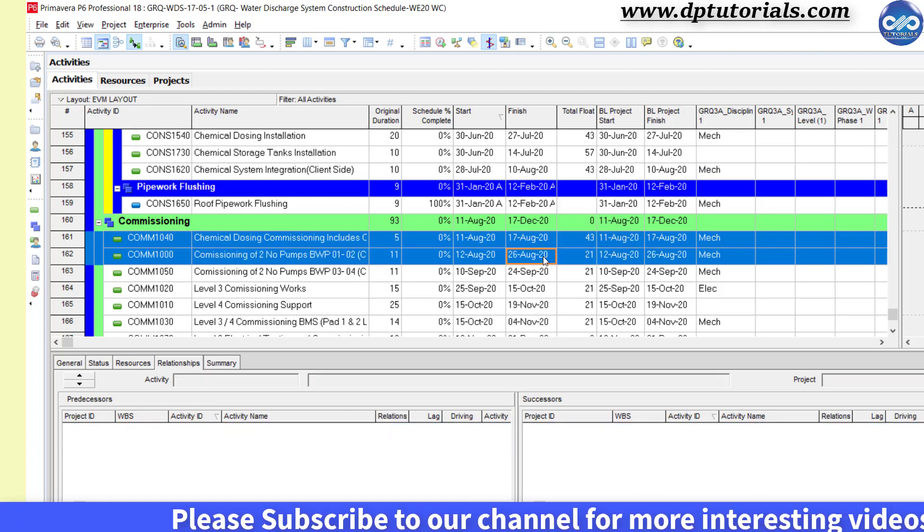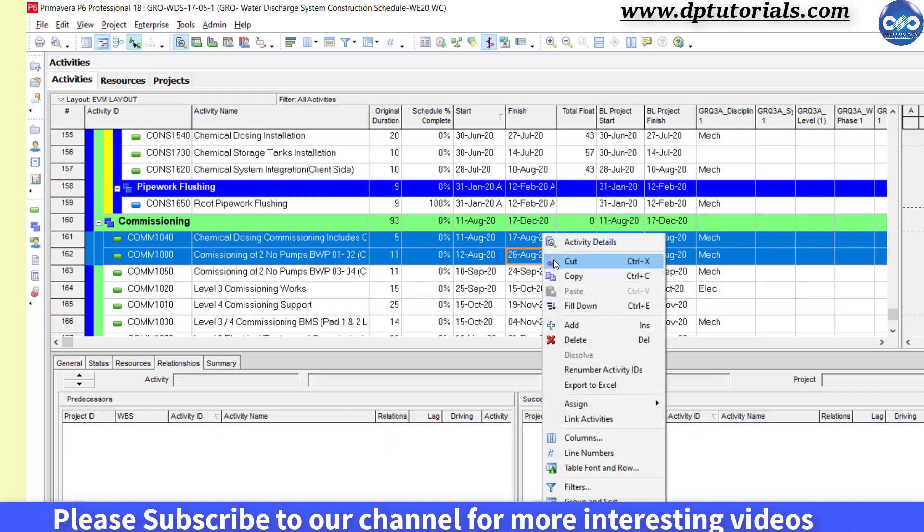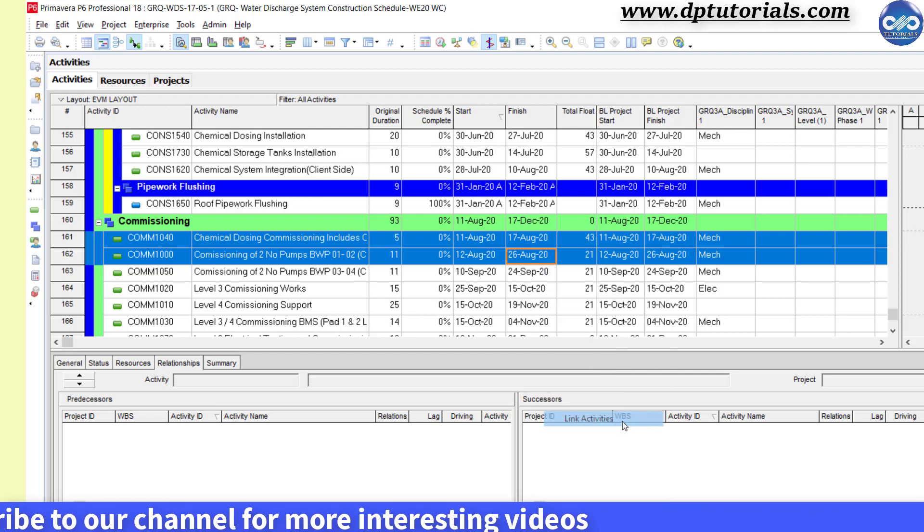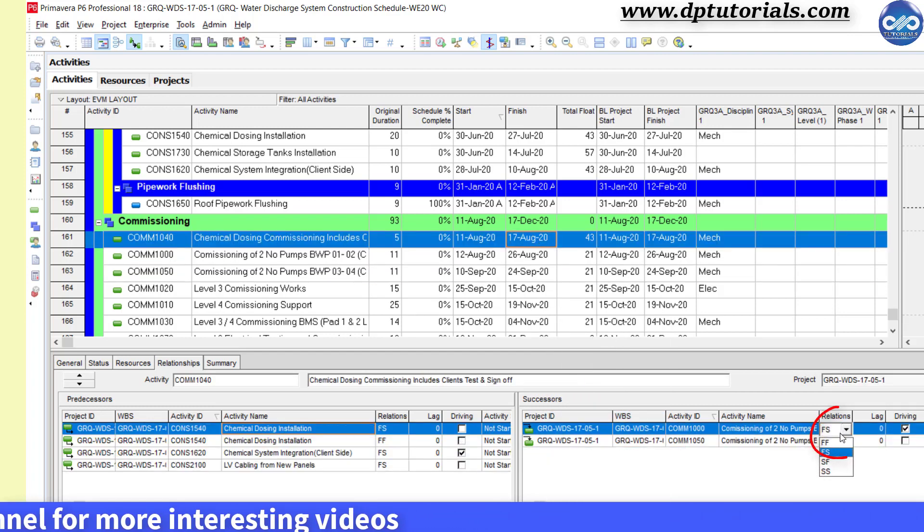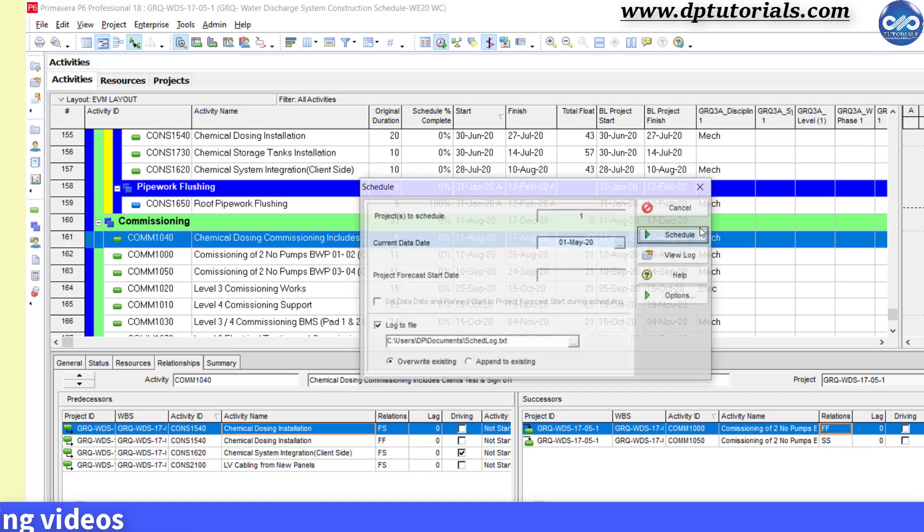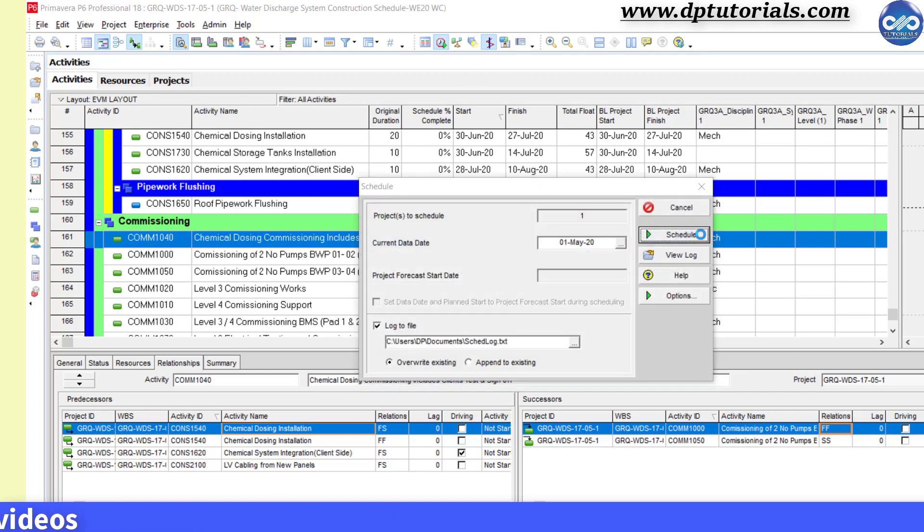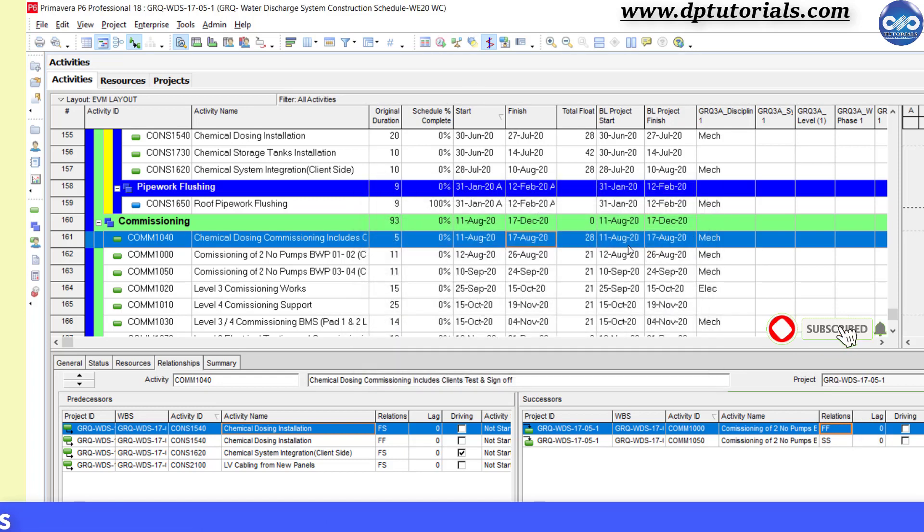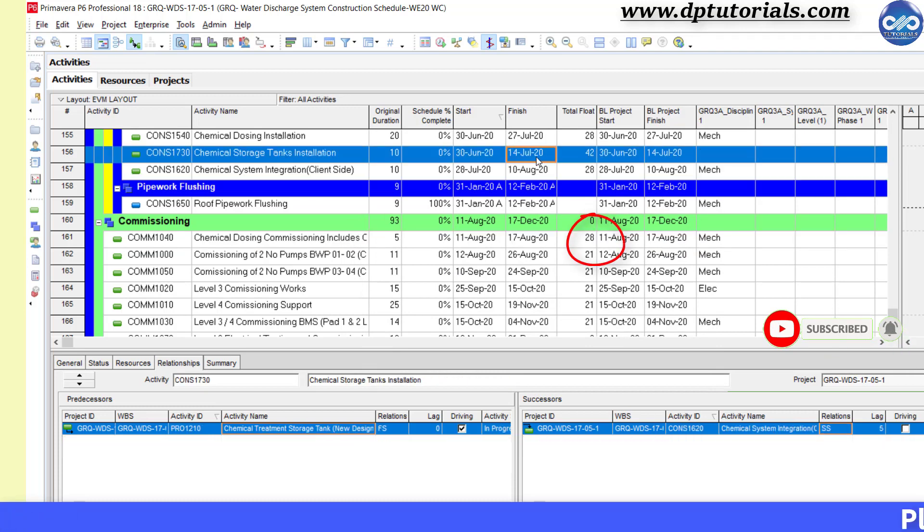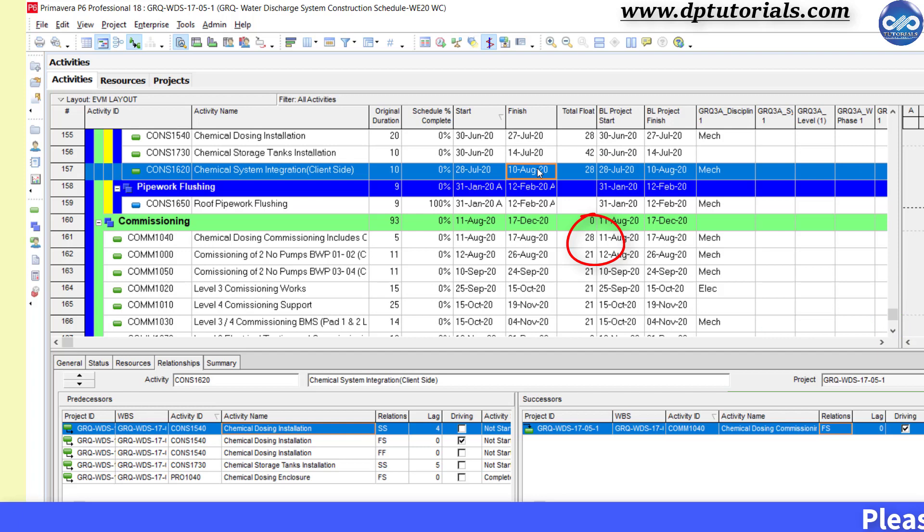The next activity and giving finish to finish relationship, and click on this schedule button or F9 as a shortcut to schedule the project. You will notice that the total float which is high has been reduced to 28, which is okay as of now.